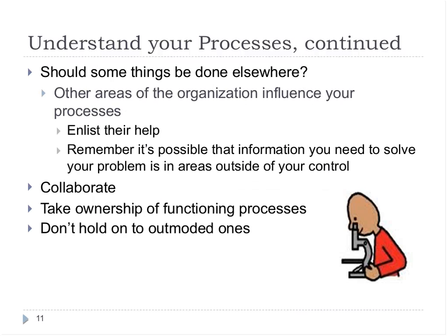But in any event, you really need to think about how long it's going to take, right? When are you going to see some of the benefits of the money that you're paying out? It's going to be in a month, in a year. Hopefully it's going to be relatively quickly, particularly with hosted. I know when we implemented imaging and workflow in the mid-90s, I figured it was going to take us about 18 months or so to get our initial investment back. I didn't do a very good job. It took us about 9 or 10 months to get it back.